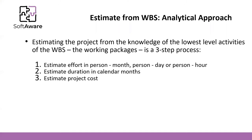We will talk about this later, but just to make the point here about effort and duration. Effort is the time that you will actually take to do the task — the work package. Duration is the calendar time. We'll come back to this, but it's important to stress the distinction.